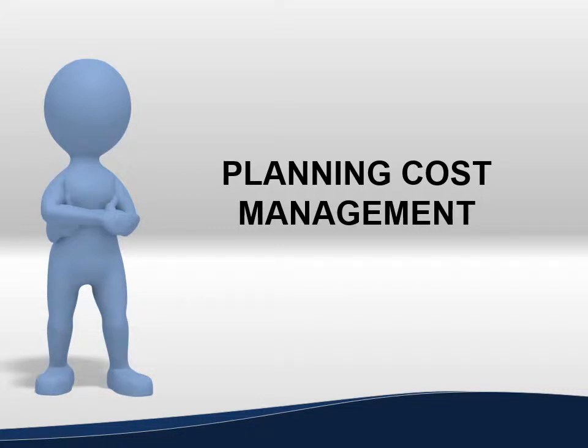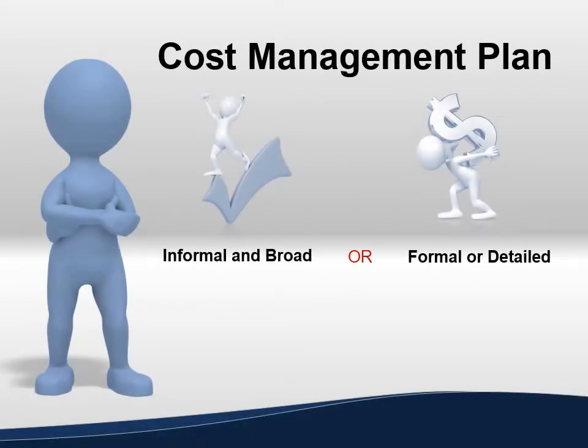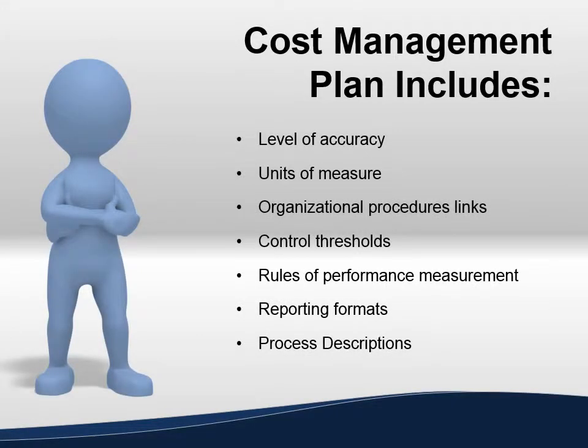Planning cost management. The cost management plan can be informal and broad, or formal and detailed. Cost management plans include the level of accuracy, or how things will be rounded, the units of measure, such as labor hours or days, the organizational procedures links, which refers to the work breakdown structure, or WBS,